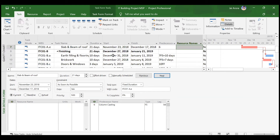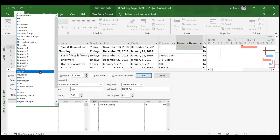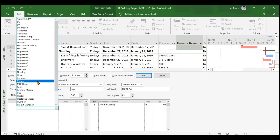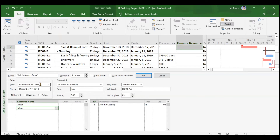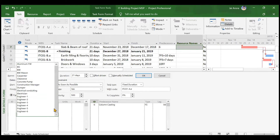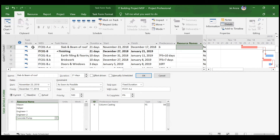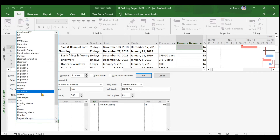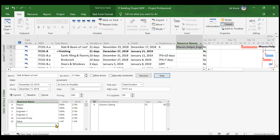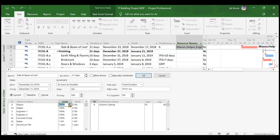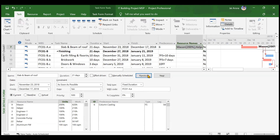For slab and beam of roof, add two masons, one helper, engineer one, engineer two, concrete pump, rebar, and aluminum formwork. Increase mason units to 200 percent. For material resources, set rebar to 50 metric tons and aluminum formwork to 100 square meters, then click OK. Now we move to the third method of resource assignment.